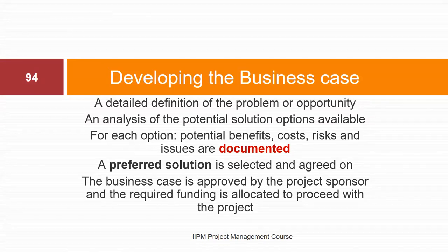For each option, the potential benefit, cost, risks, and issues should be documented. The preferred solution is selected and agreed on. The business case is approved by the project sponsor, and then the agreed funding is allocated to proceed with the project.